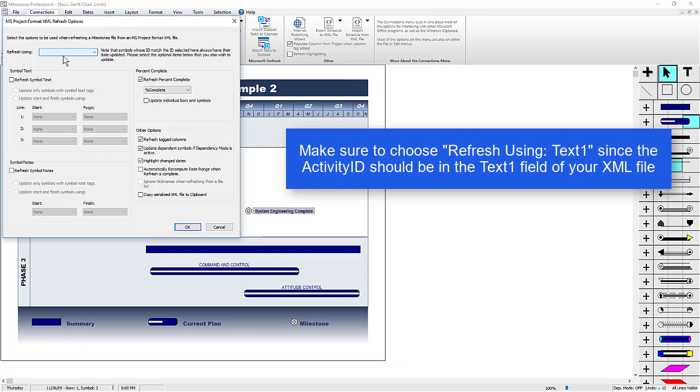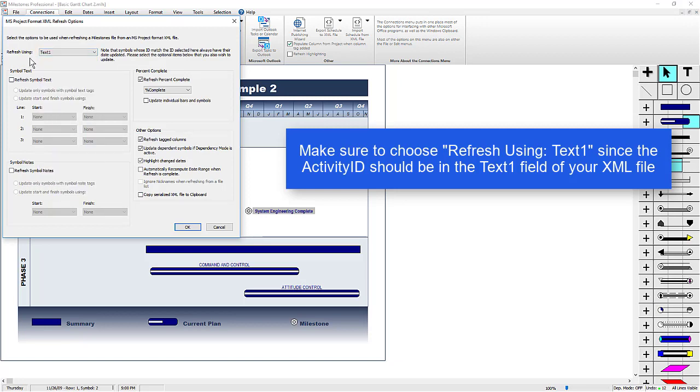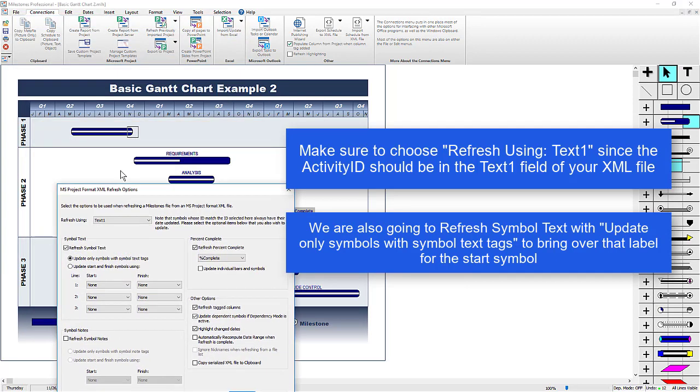And on this screen, this is the Refresh Options screen, you'll need to choose Text1 as the Refresh Using, since Activity ID should be in Text1 in that XML file. We're also going to choose Refresh Symbol Text and update only symbols with symbol text tags, so that way, on the start symbol, it's going to bring over that name field to that symbol text.